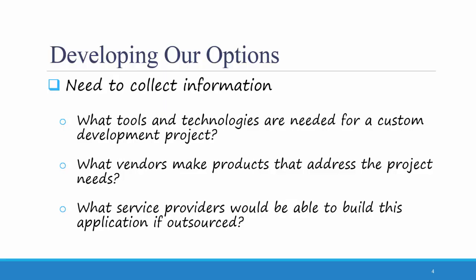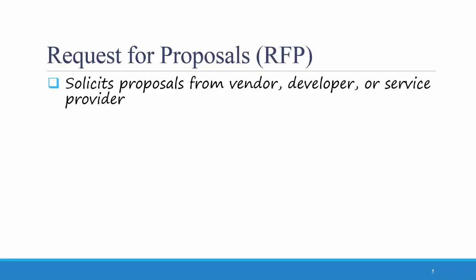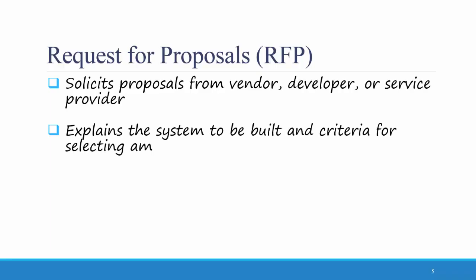These are the key questions that should drive your decision. If you decide to purchase or outsource some of your system, you'll need to create one or more Request for Proposal, or RFP. RFPs solicit proposals from vendors, developers, or service providers. They explain the system to be built and criteria for selecting among applicants.